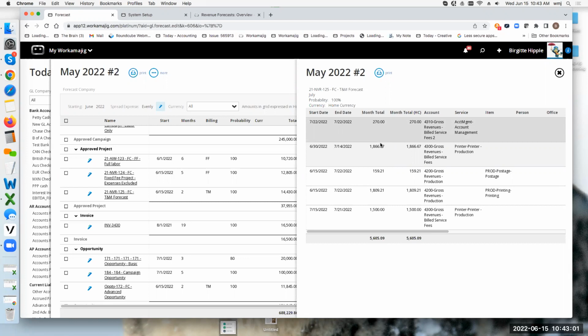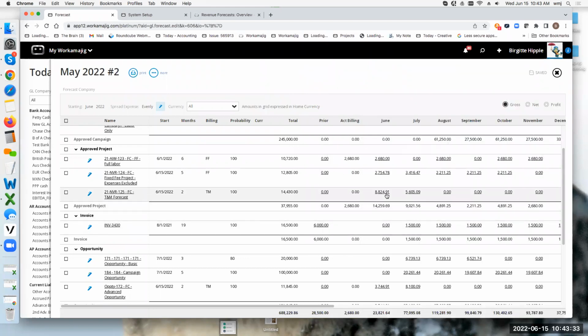So this is where it's really getting knee deep. How did I create my estimate? I created it by task and service. So I have specific services on specific tasks, and those tasks are landing on specific days on my project schedule. My revenue forecast is looking at that detail. And if you notice, here are those 2 expenses coming in, and they're being spread between the 2 months.